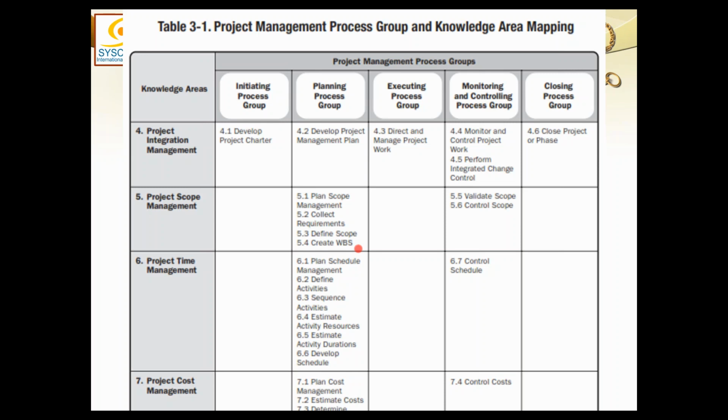Now, the project manager does not have any authority to bring any changes to this baseline without the permission of the sponsor. So, as you discussed about change control, if there is a change request, it will go through the proper change control mechanism, and after getting approved by the project sponsor and the project board, that would allow the change to happen to the baseline.